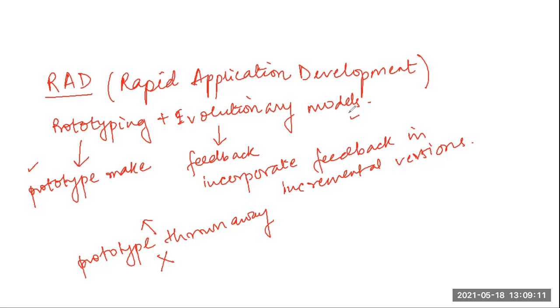Remember this, in the prototyping model, after the prototype has been created and tested, it is thrown away. But this feature is not taken in the RAD model. In the RAD model, the prototype is kept, because the prototype itself keeps changing incrementally after adding a few features.